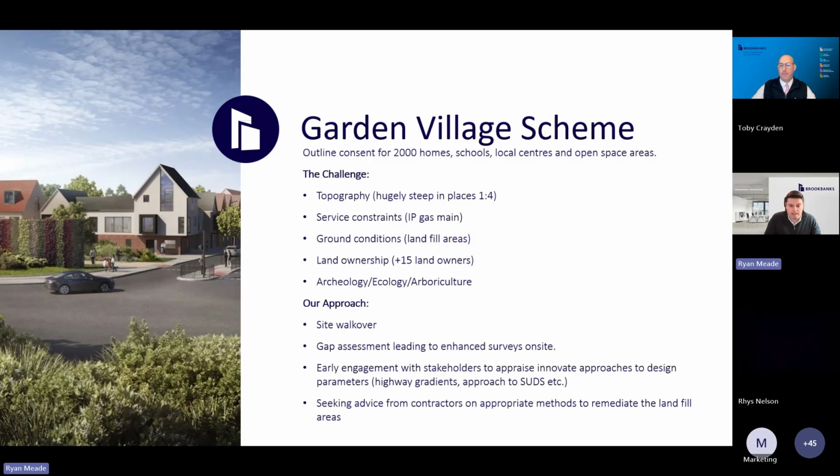This was really important in de-risking the construction sequencing, trying to ensure that the phase 1 works could commence at speed. We weren't going to be slowed down by unexpected delays. This was coupled with the ground investigation team undertaking more detailed trialling and trenching. So we had a clear understanding of where this contaminated or made ground was and how best to deal with it.